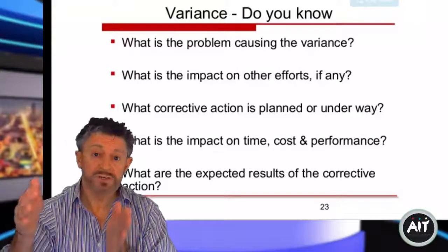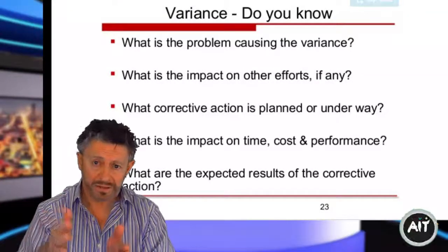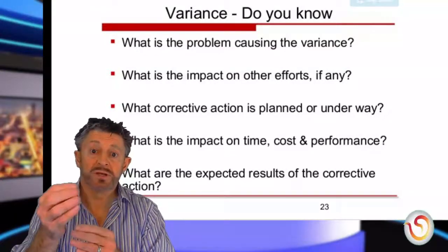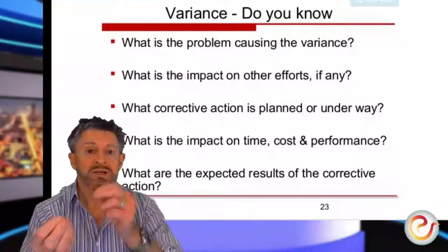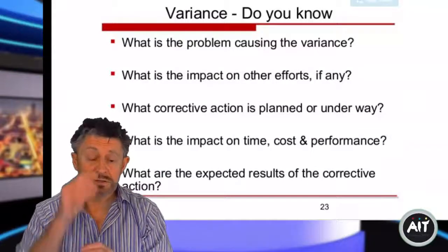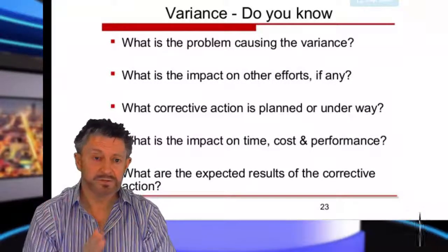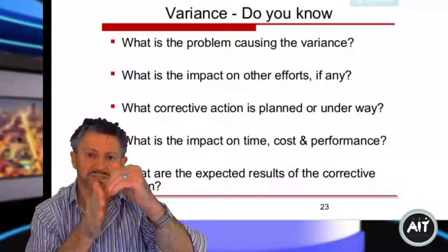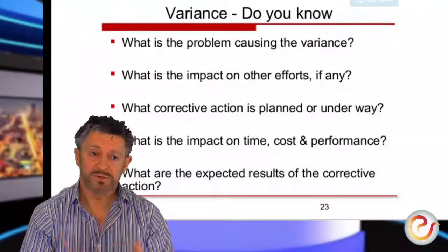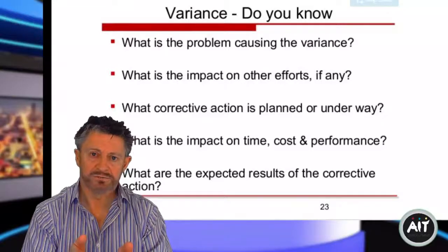If the roofers say, well, we need 2.5 weeks, and if they say, well, if we work a little bit harder, we could come back on schedule and do it within the original 2 weeks, and so you bring it back on schedule. But they might say that means we have to come in on Saturday and Sunday, so it's going to be an additional cost. But you will recover some of that, okay, some of it. So you're going to go over budget, but you can still remain on schedule if you're willing to pay for it, because it'll reduce the profit of your project.